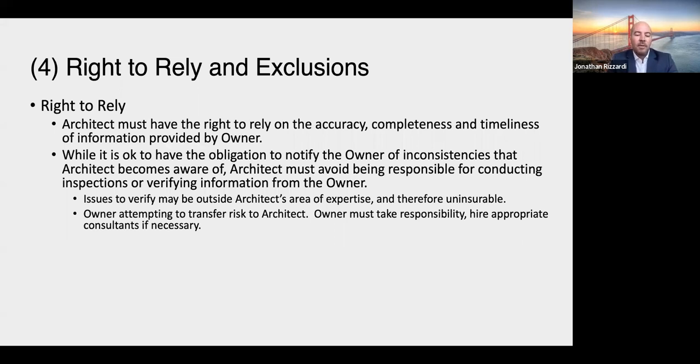You've got to really resist that if you can, because those issues could be outside your area of expertise, and as I say, they could be uninsurable, probably are, if they're outside of your area of expertise. And big picture, it's really not fair for the owner to attempt to transfer that risk to you. The owner's got to take responsibility and, if necessary, hire consultants to provide accurate information. You've got to have core information that you can rely on. It's not really your job to take the next step of verifying that information.